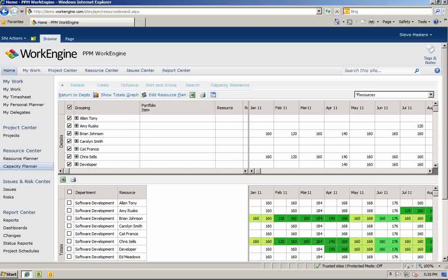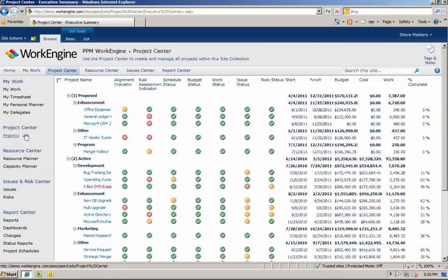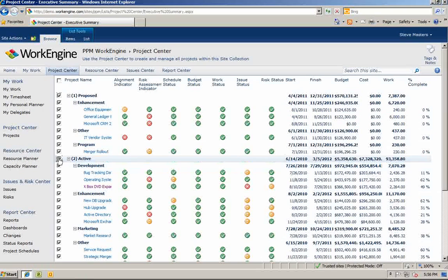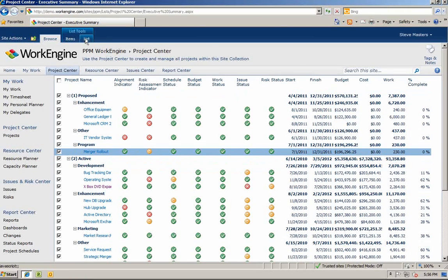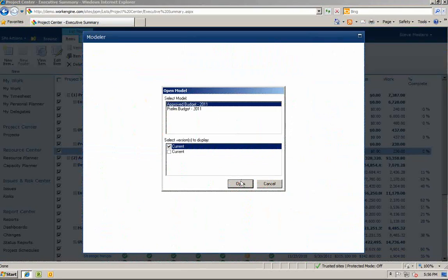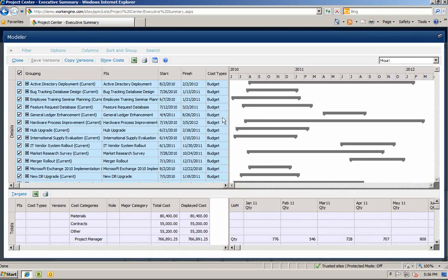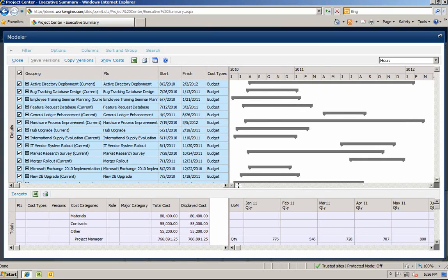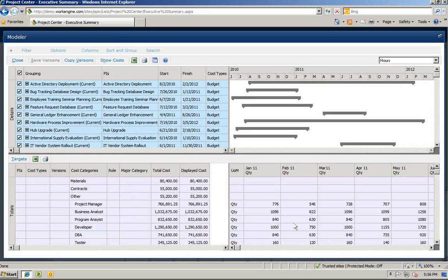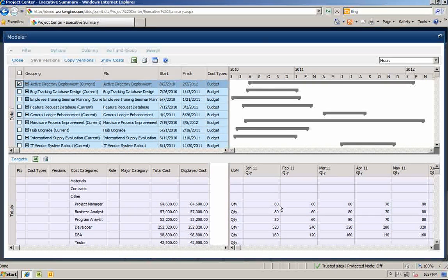The system will track the new change and notify the manager that you have requested a new resource on their project. The manager will need to approve this change in order for it to be committed. Now we can see that Brian Johnson is no longer over allocated. Let's head back to the project center list and select both the proposed and active projects. We can then click the modeler in the ribbon and select what we have in the system for our FY11 budget. You can also switch to the hours view. Once again you will see a list of selected projects in the upper left and a Gantt chart to the right containing their start and finish dates.